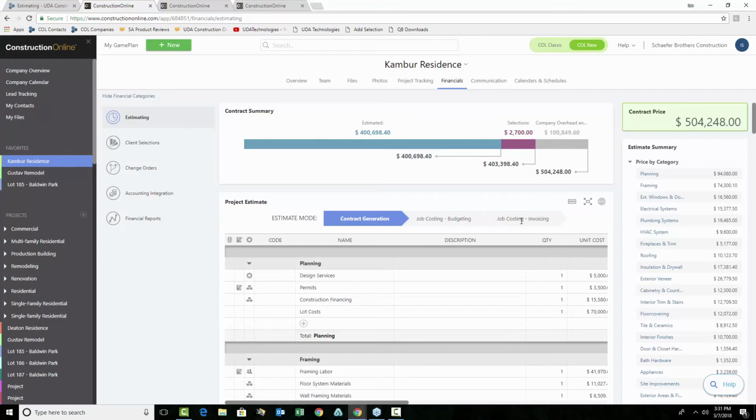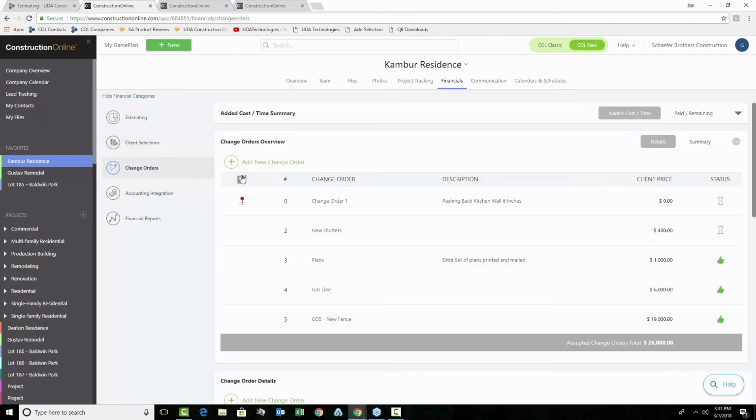But when those additional charges pop up, sometimes those charges are actually scope changes, and this is where the change orders come into play. Now with those change orders, again, same as before, you can create these from anywhere. If you guys only have your phone app with you, create them through the mobile app. You guys will be able to tie in all this information. You can, at least in theory, link it into your estimate if you want to. I find it's really easy to just put together quick change orders to present to the customer and have them sign off right there on the app itself to approve a change order.